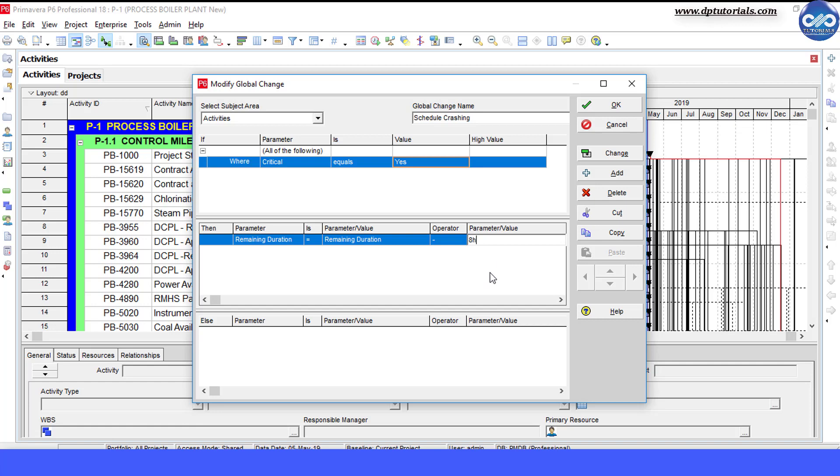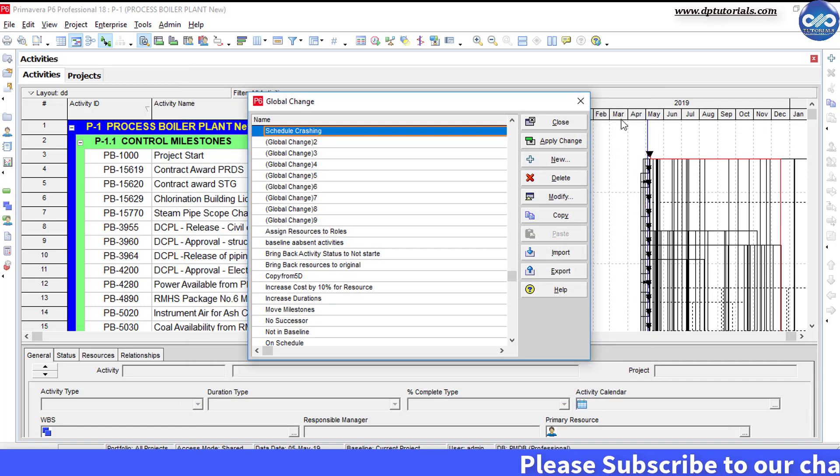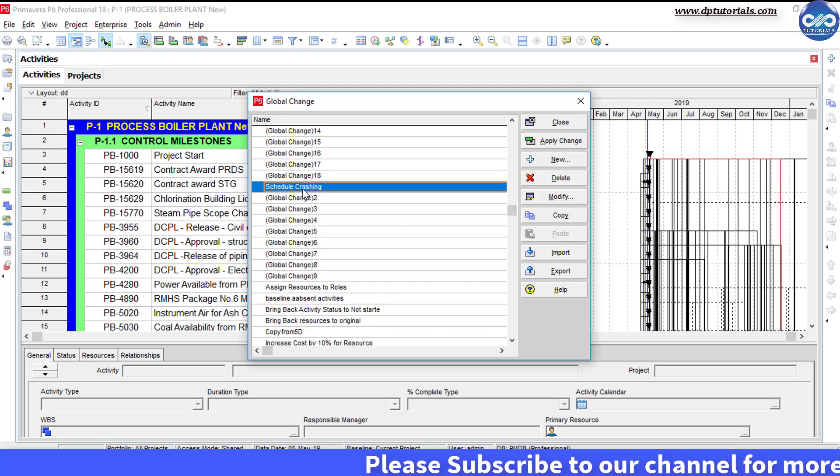So what it does is, it reduces the duration of all critical activities by 1 day, i.e. 8 hours. Now, click ok. Run the global change now.